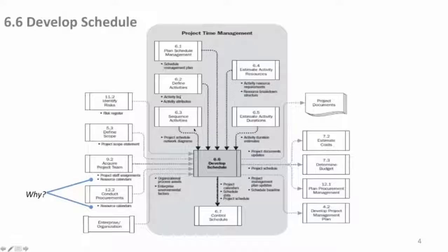So that comes in. Of course, our resource requirements come in. Here's our activity list. It comes in, of course. Durations, time, cost, and the scope, which is the activities. All the triple constraint stuff comes into this schedule. And the output is project calendars now, finally. We have a calendar of who does what when. That's a big output. All this raw schedule data.